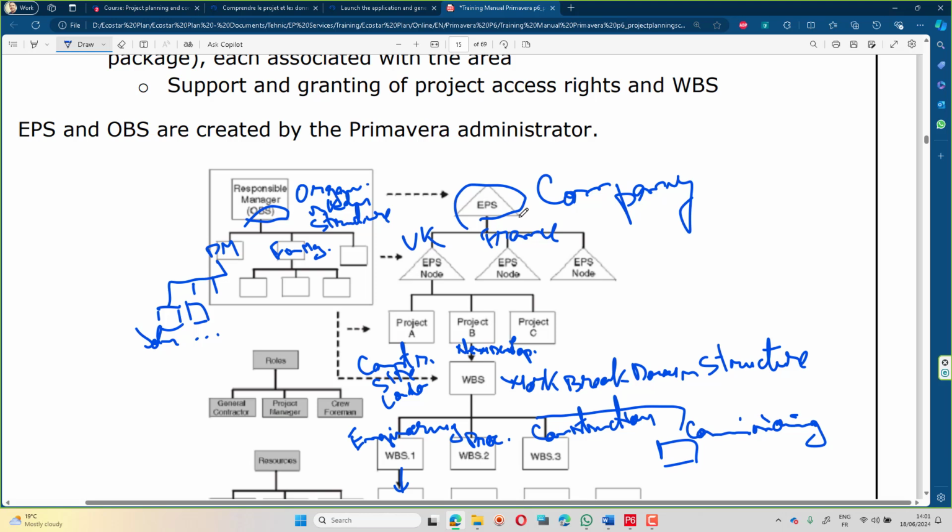Okay, so the organizational breakdown structure is the way the functions or the departments in the organization are structured. So the projects can be linked to departments. For example, the project management department can have different projects assigned, and this can help in viewing different projects according to this structure. So you need to think of it as the organizational breakdown structure of a company with the overall function and department, or the chief of department. It can be different from company to company.